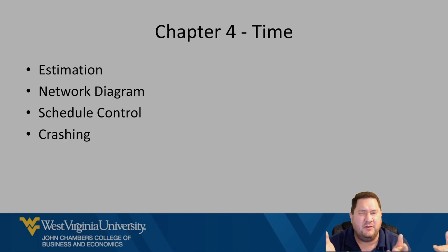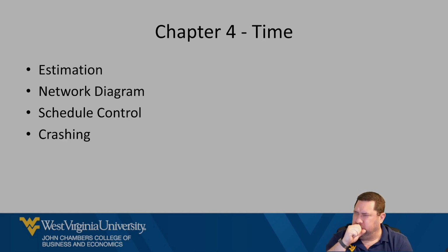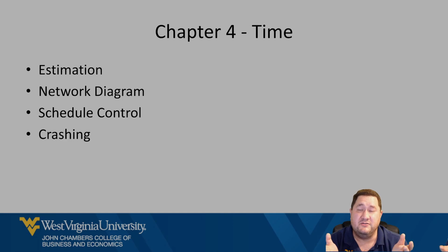How is there going to be a waiting room long enough? How are we going to let the community know where the emergency room is moved to? All this kind of stuff probably has to start first before you close the emergency room and start doing the work. So we can see the linkages between items, like what things have to come first before something else happens. So we can do all that. And then at the end, we'd have project conclusion.